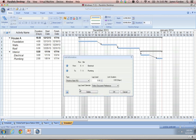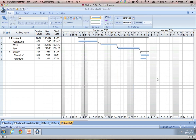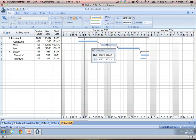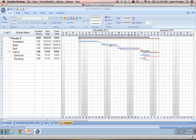You can also change the link type. The default link type is finish-to-start, but if you have two tasks like Electrical and Plumbing that you want to start on the same day, you can change the link type to start-to-start and those will now begin on the same day. Now that we have all these links and dependencies set up, this is really where FastTrack Schedule becomes alive — it will allow you to move one task and all the other tasks connected to that activity will be moved as well. If our walls task gets moved and starts a couple days late, all other tasks behind it will be moved back as well. You'll also notice that pink revised bars get set up so you can see the difference between your original schedule dates and your new revised dates and durations.